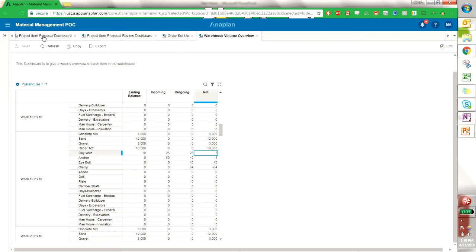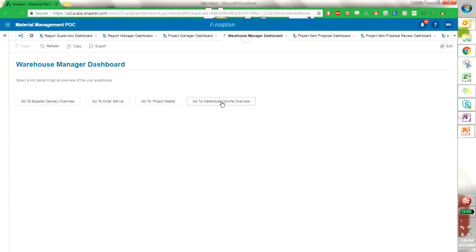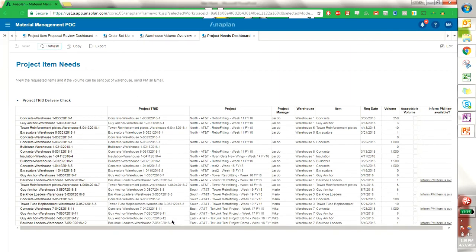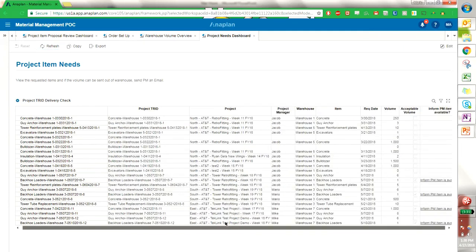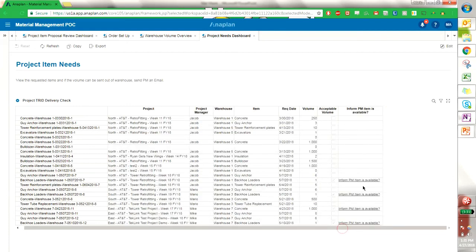Another tool that we have as a warehouse manager is to go to the project needs. Our project needs here, if I refresh the page, shows us all of the project trades that are coming in and out of warehouses. Now I would only have access to the warehouses that I have security to, but I am an admin so I have access to everything. So we can see here that this line item says that we can inform the project manager that this item is available, meaning there is already volume in our warehouse and that we will not need to create an order in order to fulfill this project need.